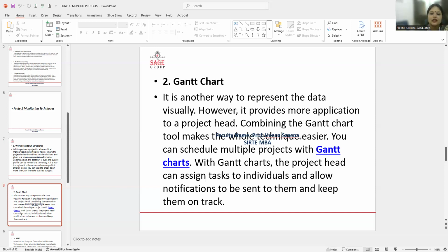Now the fourth is the critical path method. Here the critical path method requires you to record a model that contains all the tasks and activities, the time allocated to complete them, and the milestones for the project. Using this information, you can figure out what tasks can start at the earliest and can be completed without impacting the project's overall schedule.